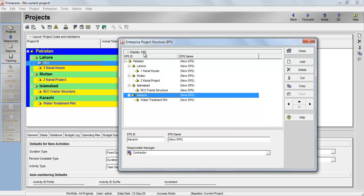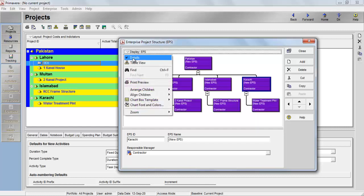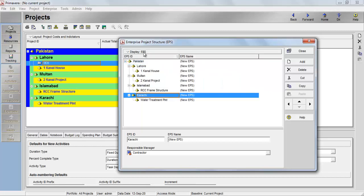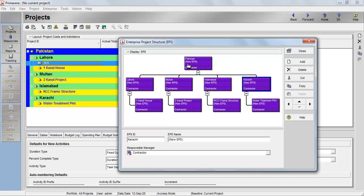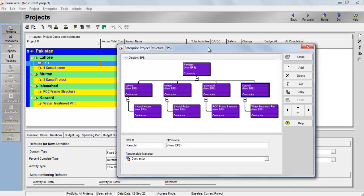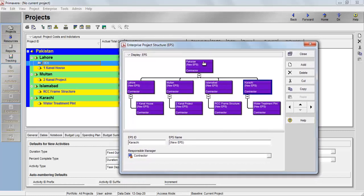To see a chart view, click here and switch from table view to chart view. You can see Pakistan at the top. The responsible person shows as 'contractor' because we haven't assigned the organizational breakdown structure yet. Underneath Pakistan we have Lahore, Multan, Islamabad, and Karachi at the same level. Under Lahore is 'one canal house', under Multan is 'canal project', under Islamabad is 'RCC frame structure', and under Karachi is 'water treatment plant'. That is why EPS is described as a hierarchy in its definition.